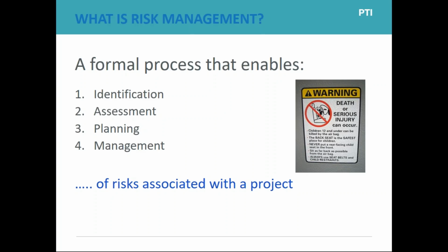So risk management is a formal process, and as we have looked at, just to summarize the last couple of slides, you identify your risks, you assess your risks, you plan how you would manage or mitigate them, and then you manage the whole process, and you keep doing that throughout your project.